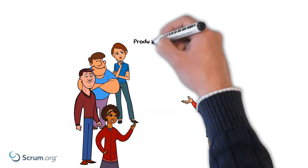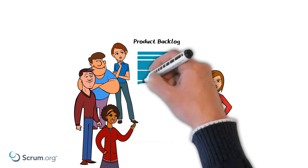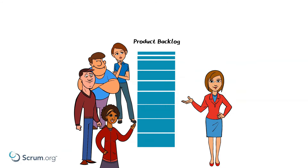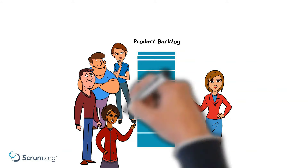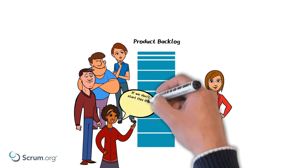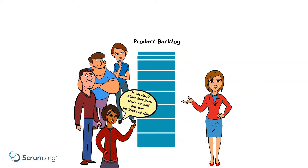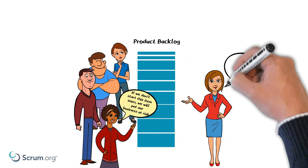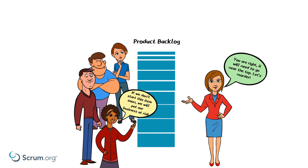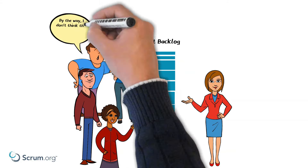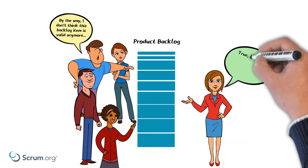Next, Cassie shows the Product Backlog, which is a list of things that are needed to improve the product. She has already ordered the backlog and put what she believes to be the most important items at the top. Cassie and the developers, Steve, Blake and Nisha, discuss the order of the backlog. Nisha points out a Product Backlog item that's lower on the backlog, and she raises her concern that if the team does not do this item earlier, their business can be at risk. Cassie realises her concern is valid, and they agree the Product Backlog item should be nearer to the top. They also find there is a Product Backlog item in the backlog that is not relevant anymore, so they removed that one.